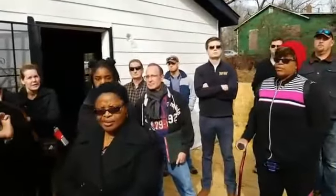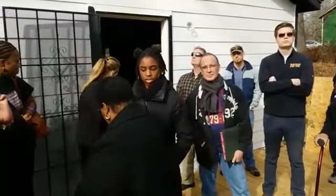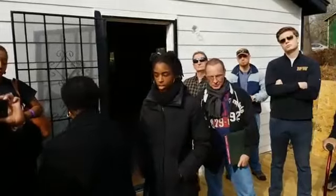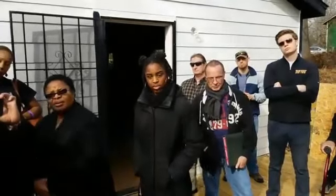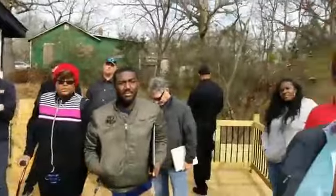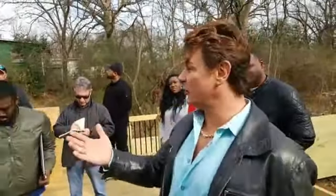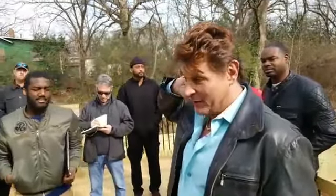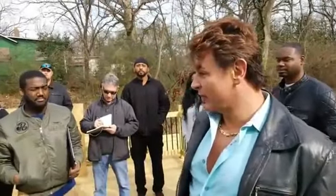All right, we had a question online. This is David again. He was the one interested in your crews. It's like two questions. So you have four crews doing 8 deals a month. What's the average renovation cost? It takes my two-man crew 3 to 4 weeks to do a $40,000 rehab. My rehabs are on a 10-week schedule. So if everything goes the way it's supposed to go, I'm out in 10 weeks. I get the house listed and sold and get my money back in 4 months, and I do it again.